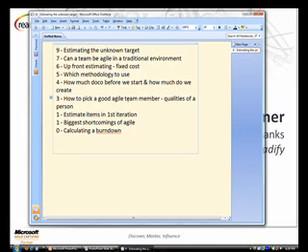The same theory applies when you're doing fixed cost. It doesn't matter how you're going to deliver it. You've still got to have that initial run through of what the requirements are and how much work is roughly involved, and then apply whatever your risk factor is and everything else to get an approximate size. Because you're never going to tell the customer, well, I calculated 400 points, therefore it's going to be exactly 200 days. Internally you'll go, okay, it's roughly 400 points, that means it's going to be roughly this length of time plus my risk factor, because you know it's already a project that's going to take more than 6 months, so I've got a different risk factor depending on duration.